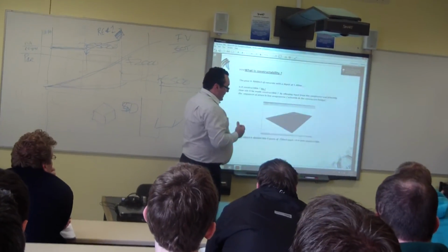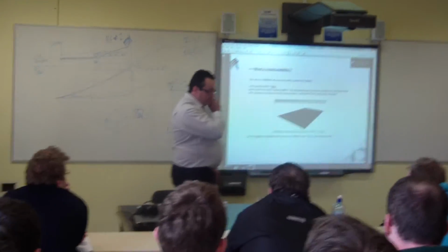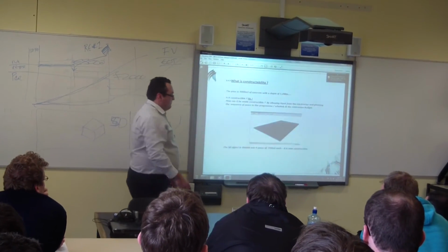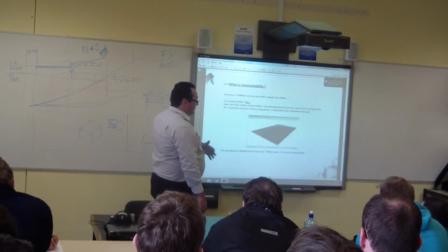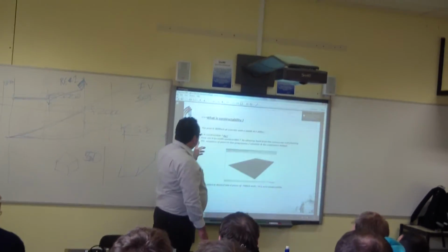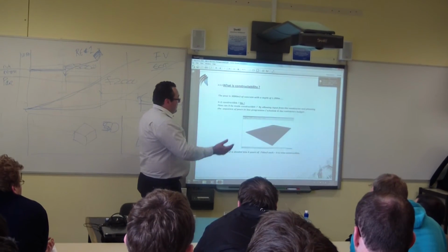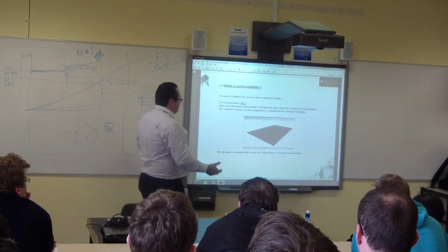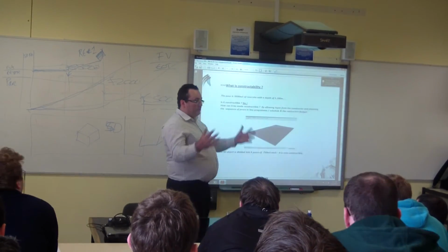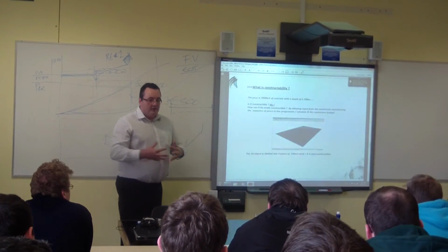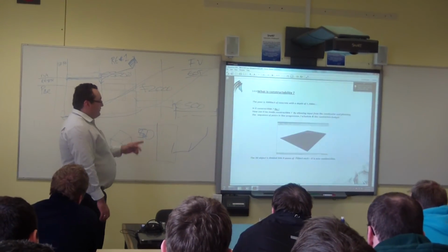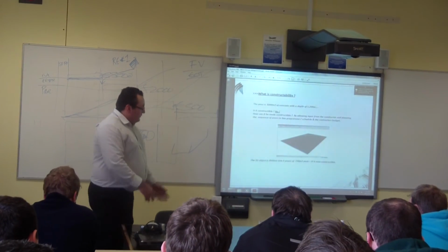In Dublin City Centre, I imagine you could pour about, on a good day, 600 to 700 cube, roughly. Core, same as well, like, you know. Excavation, you know. So designers don't take that into consideration. So how can it be made constructible? By allowing input from the constructor and planning a sequence of pours in line with program, schedule and the contractor's budget. Okay, we're going back to the multi-party thing again, where everybody's talking, because designers aren't going to talk about that. The 3D object is divided into 4 pours of 750 cube each, which is now constructible.